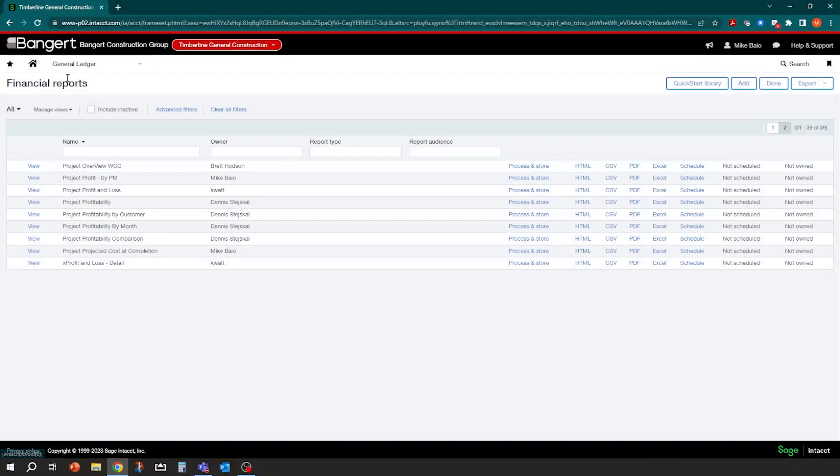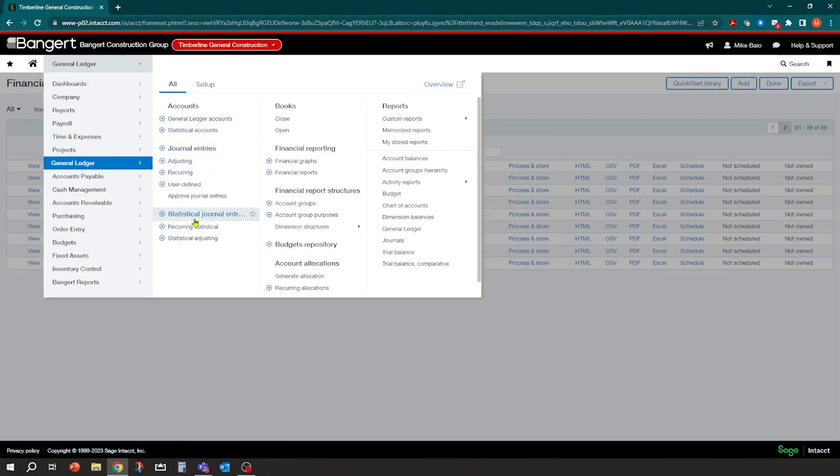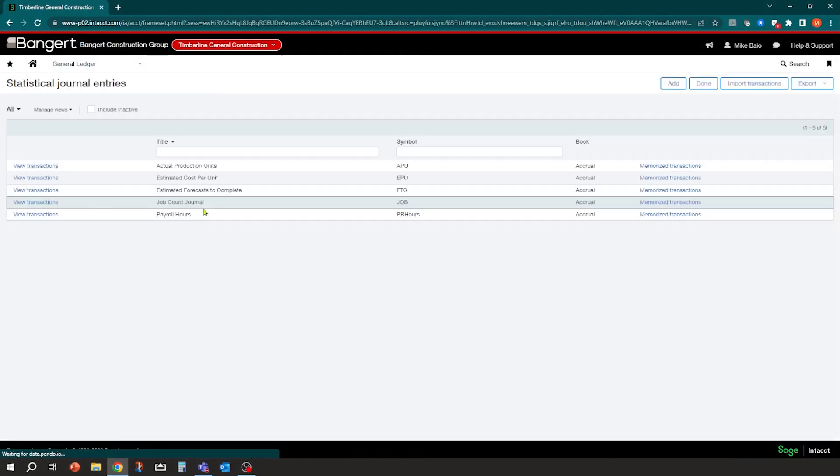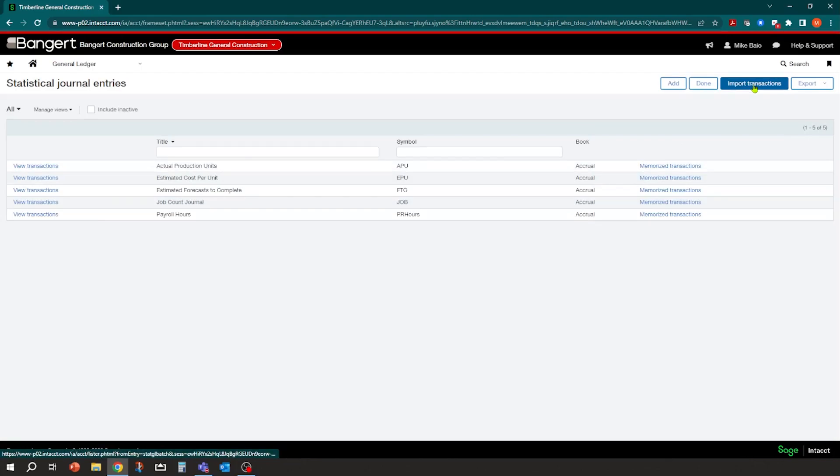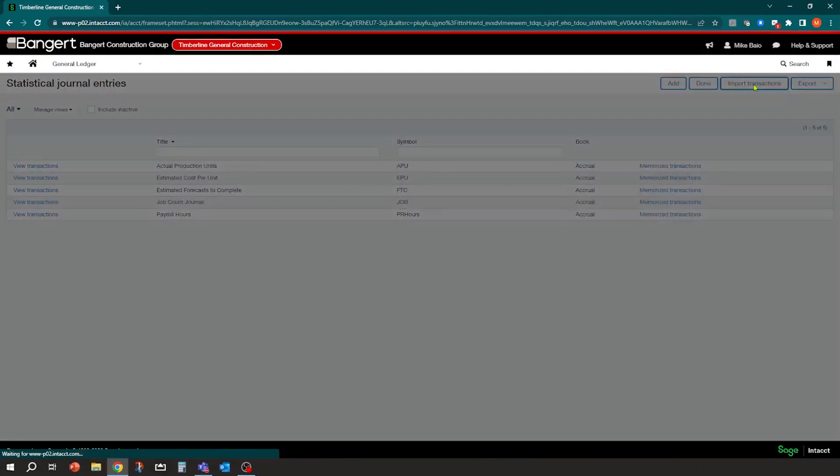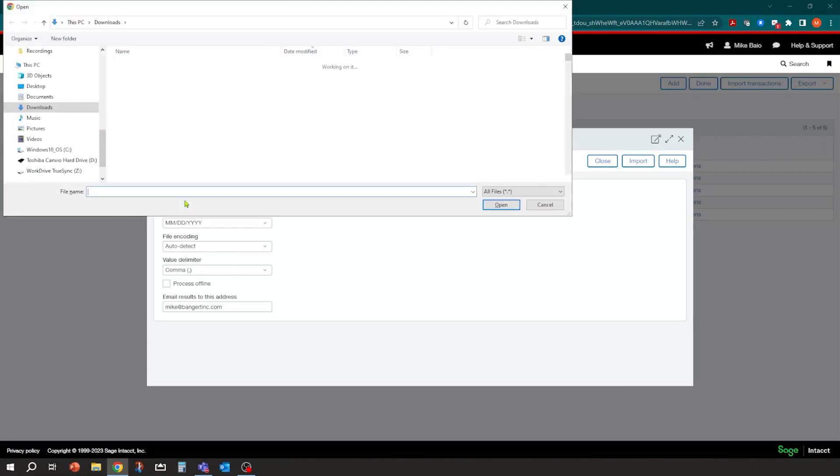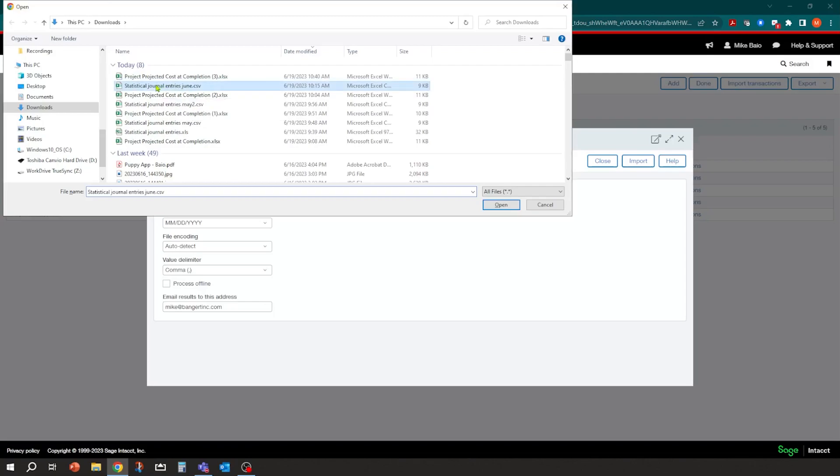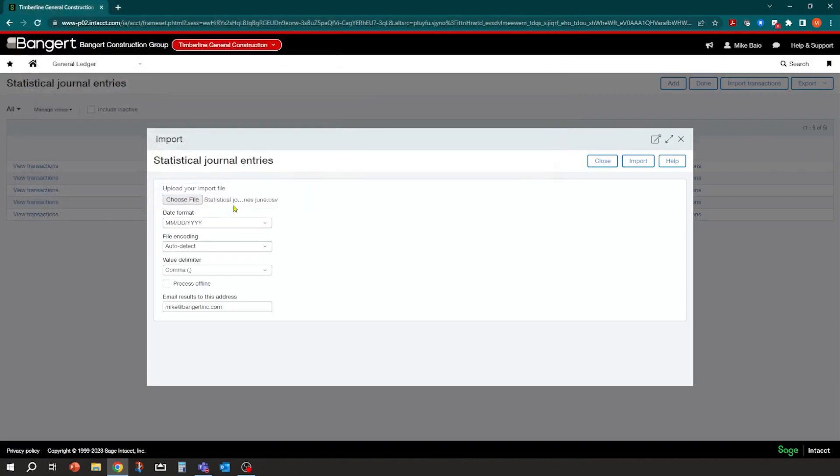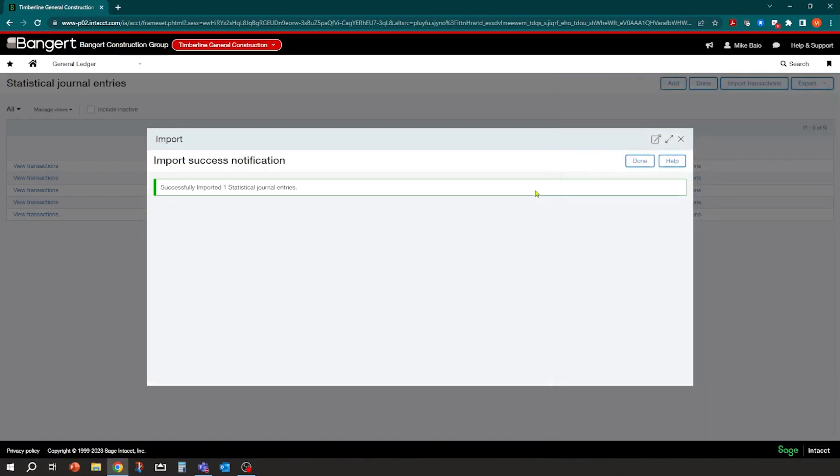And right from the system here, I can go into statistical journal entries. And again, these can be favorited and I can click import transactions. So I can click import transactions. And all I have to do is browse to that file. So I have it in my download folders and there's the June projection. And I would probably have this labeled with a job number on it too, if I was just doing one project, but you could import multiple jobs at the same time as well. So I'm just going to open that up and then choose where the results go to, which email, and you click import. And the system's going to go and actually import it.